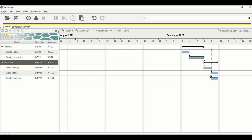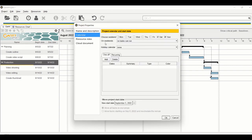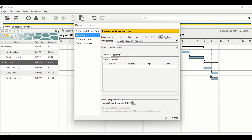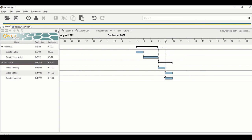If you have tight deadlines, you may need tasks to run six or seven days a week. To change the weekend setting, go to Project, then Properties, select Calendar. The default has weekends blocked. Click the dropdown, select 'All tasks run as on other days', then uncheck Saturday and Sunday to enable seven-day work. Click OK and now work resumes on weekends as normal.